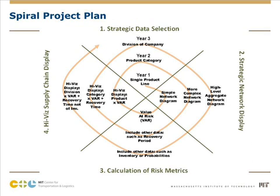Our project plan over a three-year period is to start very small the first year with a single product line and a very simple metric — value at risk. Year two, take on a product category with a more sophisticated metric including recovery period. Year three, get a division of a company with a more complicated network, perhaps adding inventory and probabilities to create a very valuable high-vis supply chain display for senior management.